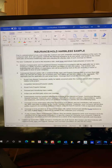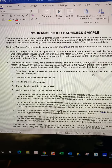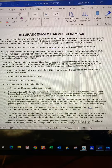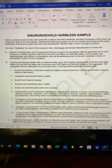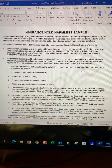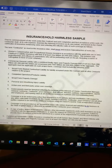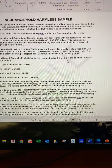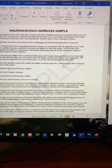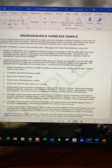I'm looking at additional insured requests from very sophisticated parties — counties, cities, large and small developers — people that should understand this, and they simply ask to be named as an additional insured. There are a bunch of additional insured form numbers. The CG2010 1185 version is kind of the gold standard. You can't get that very often anymore, but you can get the equivalent: a CG2010 1114 combined with a CG2037. You need both of them, and you need the right version year. Just asking to be named as an additional insured is not a very good trigger.